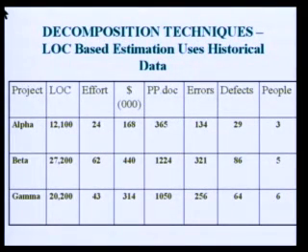Beta. The number of lines of code required here is 27,200. The effort is 62. There are 27,200 lines, but the effort is 62, meaning 62 person months. So one person can do this project in 62 months. That is the calculation. So if you are employing 3 people, then you can do this project in around 21 months. In this way the numbers go down, but you should indicate effort in person months only. It is going to cost $440,000.